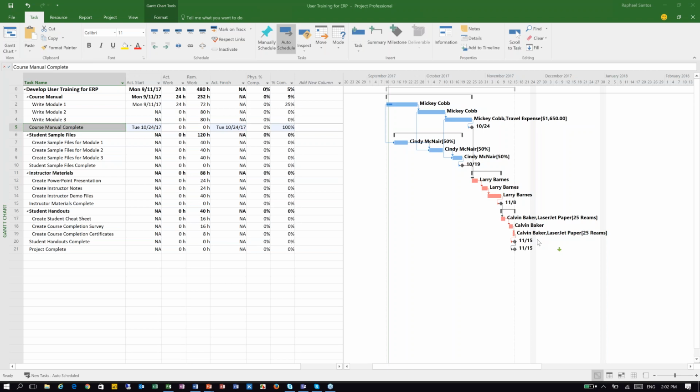So then you are going to be saving your baseline 0. The baseline 0 is the one that you are going to be using to compare what has been planned with the execution, right? But I like to save the baseline 1 as well. I like to copy the information that is stored in baseline 0 into baseline 1.